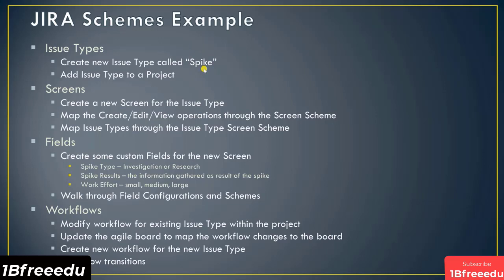It actually exists in some types of Agile methodologies like extreme programming, and basically represents a ticket that involves research or investigation or design, basically something where you would need to gather information. An example would be having a feature request that can't be estimated because you would need to do some research on technology or feasibility of the request before you can actually work on it.